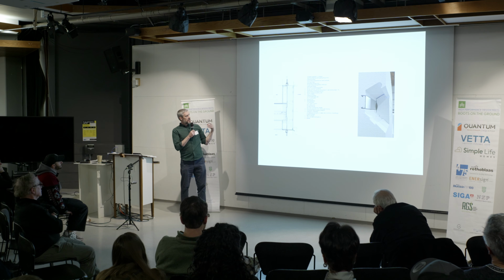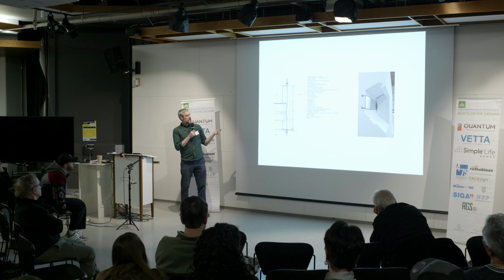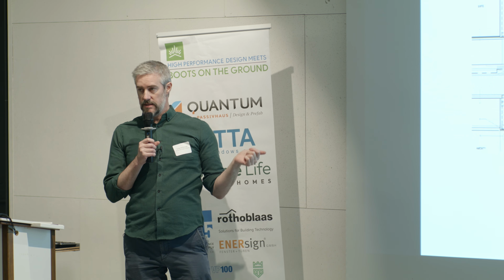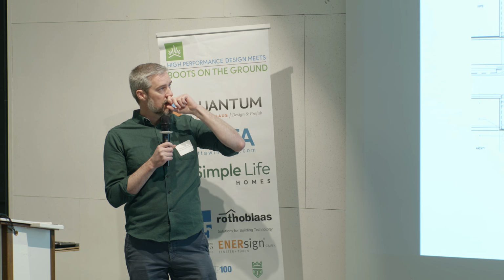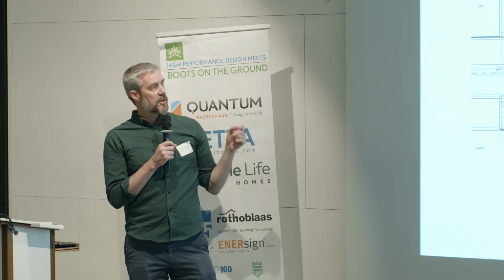But one of the products that we sourced to meet the demands of the schedule, because insulation was very hard to get in the latter part of the pandemic and the early phases out of the pandemic, was this really interesting product, thermal wall by a company called Legolit.